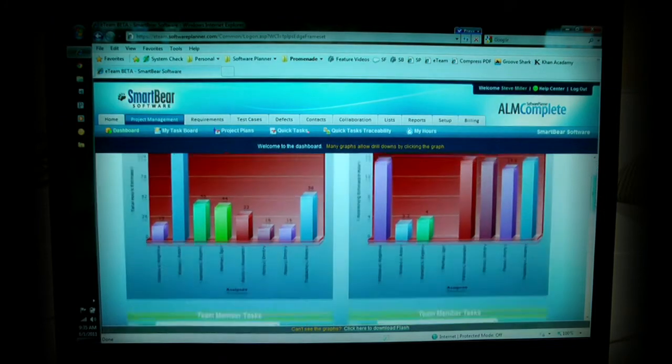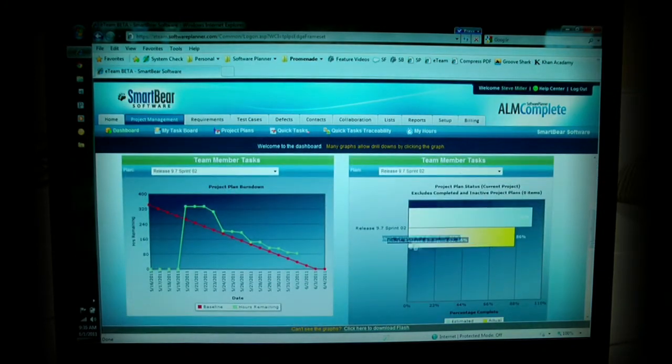Right. And then the other thing, we were talking a little bit earlier about simplifying whether you're on track or not on track, and that's where these burn downs come into play. In fact, we're working here on Sprint 2, and you can see the ideal line. This red line is showing, day by day, if we work on this, our effort should go down this way. This green line here is showing you what people are reporting they have remaining left to do. So I can see today that I should have, by the end of the day, about 39 hours remaining, but my team's reporting we have about 85 hours, so we're slipping just a little bit. So this particular line here will show you exactly where you're at in that process.